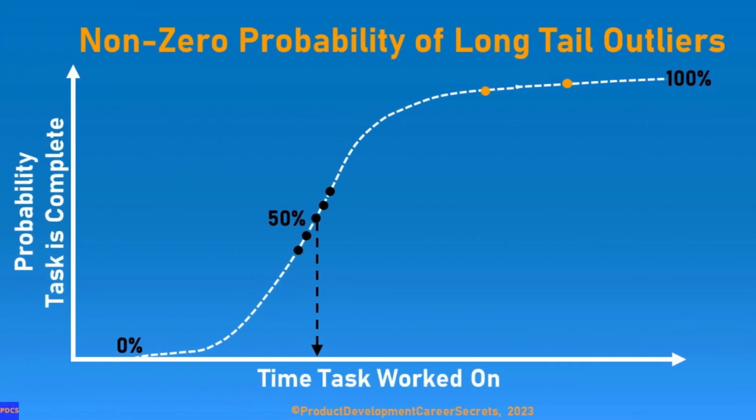There is one situation where this balancing of early and late completions will not address. There is a non-zero possibility of some tasks having outlier hurdles to overcome. These cases cause the total project time to be skewed much longer. There is a solution though. This can be addressed by building some contingency time at the end of the project. Ideally, none of the contingency time gets used, but if necessary, portions of the contingency time can be doled out, can be approved on a case-by-case basis.